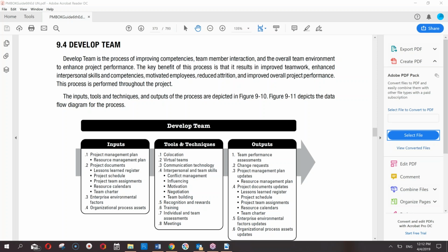Naturally, you will be conducting a number of meetings with your team members during this phase. There is no actual project work happening, but you are preparing and developing the team. Once the team is developed, you have a proper team performance assessment ready. If in doing all this you came across a case where the scope, time, or cost baseline was disturbed, you may raise a change request. Otherwise, you can simply update the project management plan and project documents.